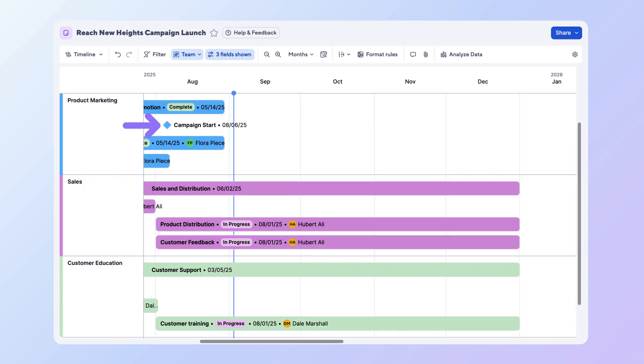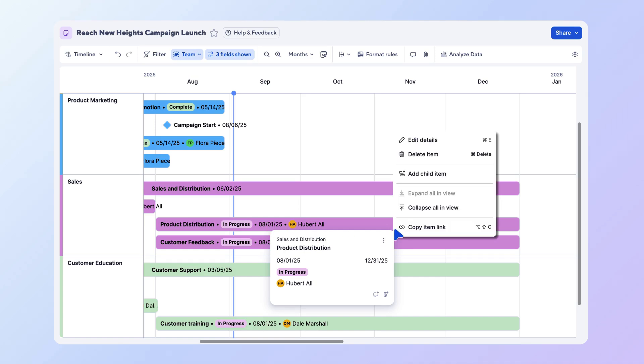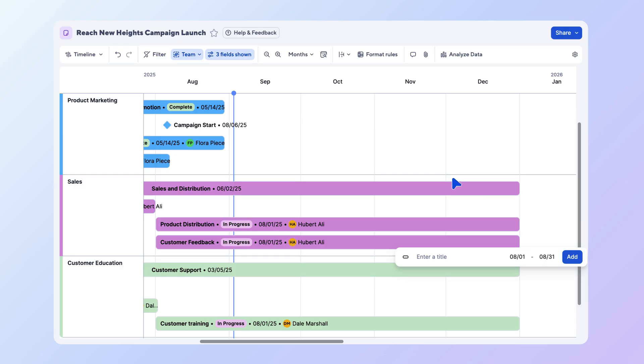they appear as milestones, making it easy to highlight important events alongside project work. To add a new item, select any blank space in the timeline or select an existing item and add a child item. Enter the name and